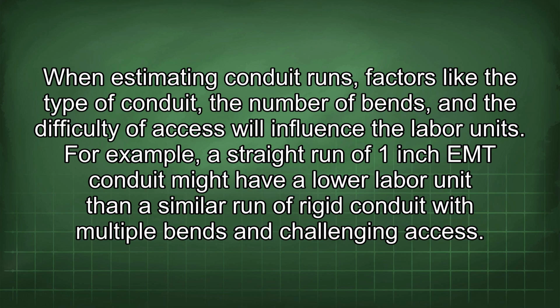When estimating conduit runs, factors like the type of conduit, the number of bends, and the difficulty of access will influence the labor units.